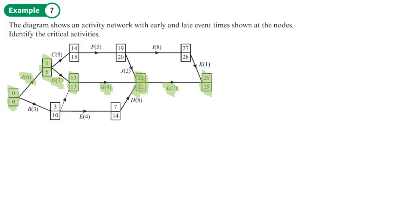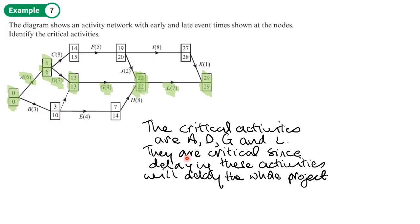So the critical activities are A, D, G, and L. And we could add here if we wanted to, although this is a definition of critical activities that are critical since delaying these activities will delay the whole project time.